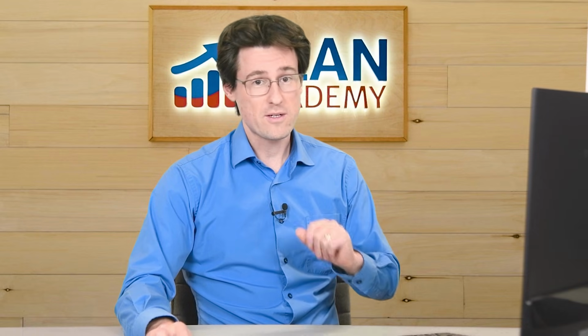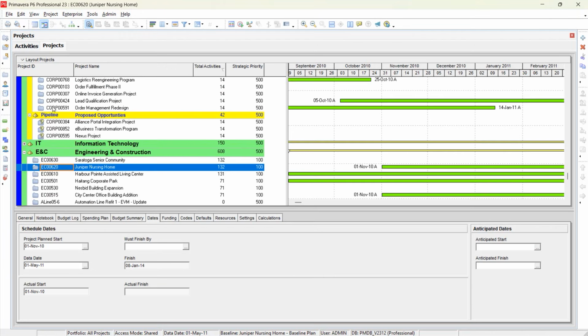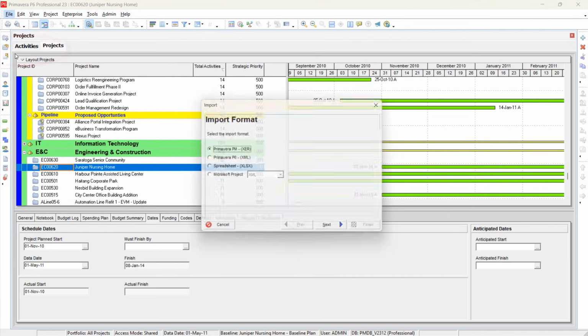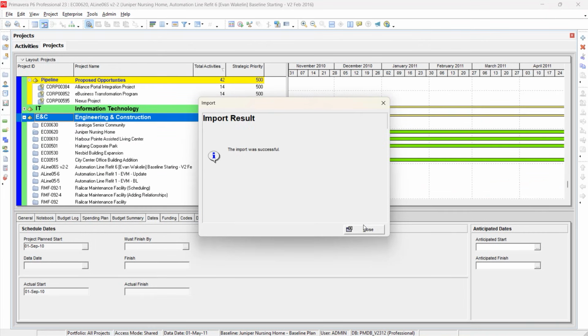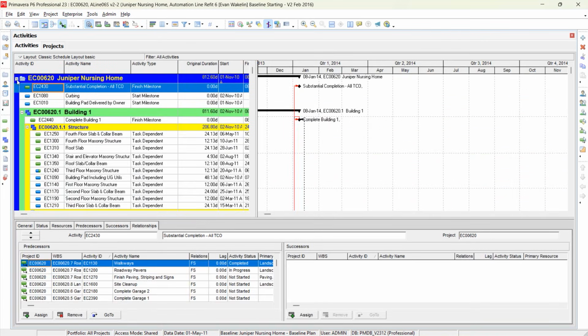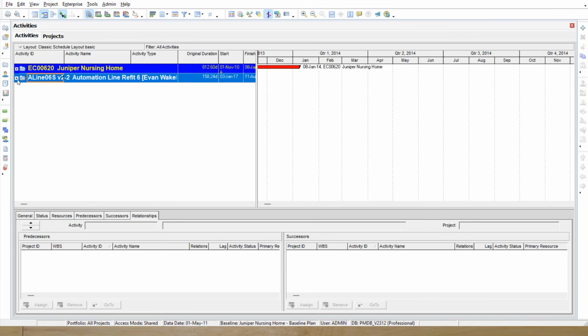However, and this is where you can get slipped up too, if you're opening another project, let's say you want to import a new schedule or an XER, an update. If you've already got a project open and you import a new project, you go to your activity screen, it doesn't close the other one. It just imports it, and now both are open on your activity screen. I'm not sure if that's helpful for that to be a thing, but I guess it could be in some cases.